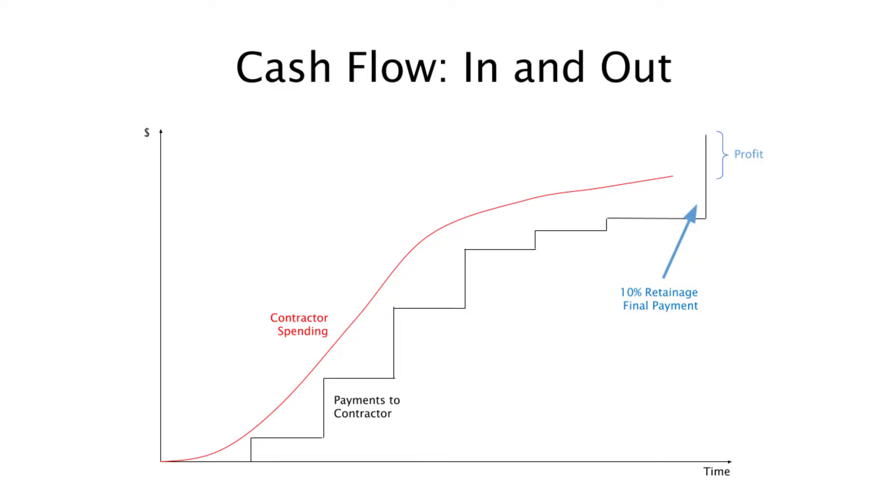So that lag is problem number one for the contractor. Problem number two: in most contracts, the owner does not pay the contractor the full amount requested. He or she deducts 10%, and that's retainage. They also call it retention in some parts of the world. It's kind of leverage that the owner wants to keep on the contractor to make sure that the project is completed according to the terms of the contract. As we see here towards the end, the contractor is in negative cash flow the entire life cycle of the project until the last payment comes in. The last payment is probably the biggest payment—it includes not only the last progress payment but also the retainage of the contract.